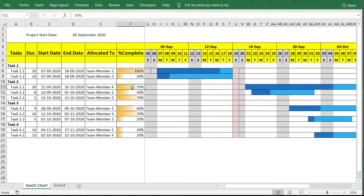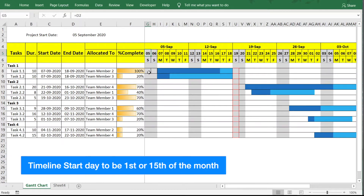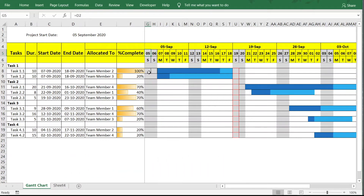The next thing we'll do is make the timeline start date dynamic. The timeline start date is currently the same as our project start date. What we want is: if the project start date is between the 1st and 15th of the month, show the first of the month; if it is after the 15th, show the 15th of that month.